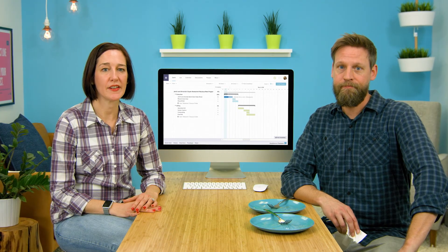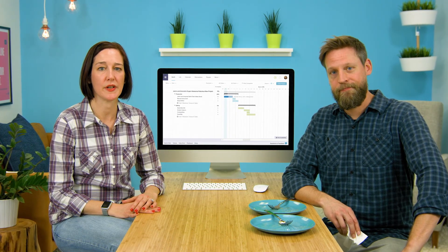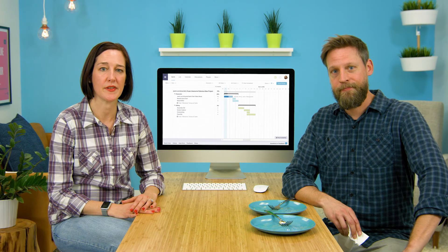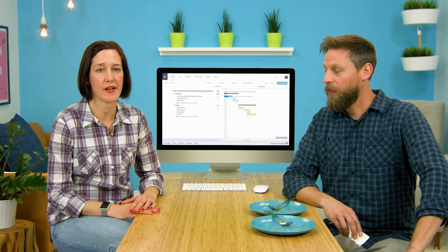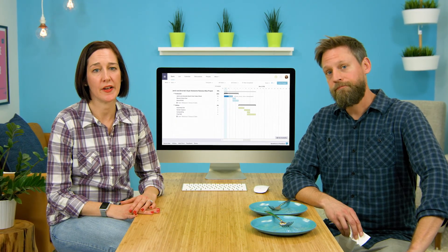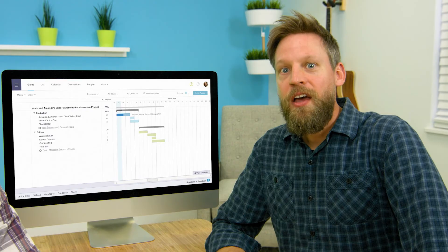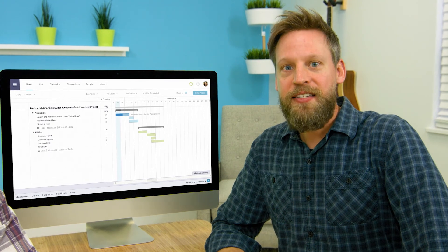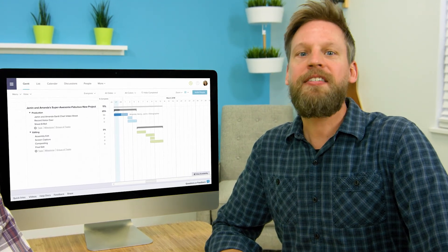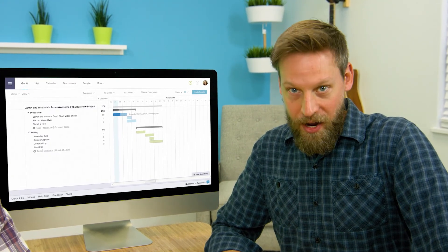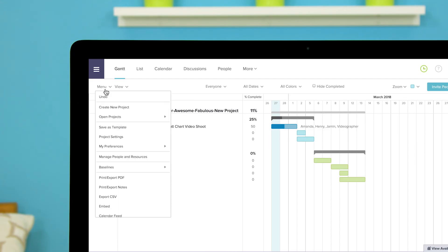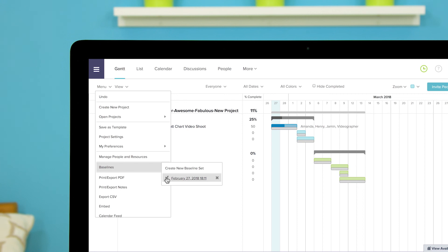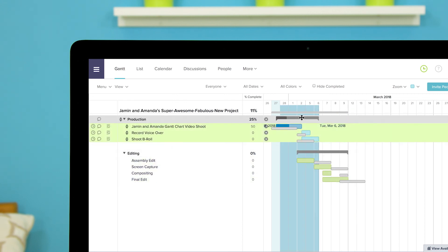Baselines give you a snapshot of your project progress at a given point in time so that you can see if there are tasks that are running on time ahead or most importantly behind schedule. Creating a baseline set is super easy and you can create as many sets as you want in a project. Just click on menu then baselines then create new baseline set. Your new baseline set is created so you can see where your project runs ahead of schedule or falls behind.